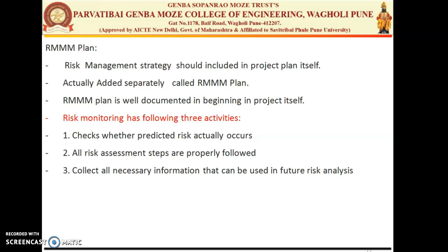So this is the first risk, computer crash. We have taken the example of computer crash for understanding the RMM. What three steps does the computer crash have? First is the mitigation. That means you need to avoid the risk of computer crash. That means you need to keep multiple copies of the database, so the data will not be lost if the computer crashes. Second is to monitor. That means your manager needs to frequently watch your working environment where the actual team works. And the third is the management. If something goes wrong, we need to take immediate actions so we can avoid or manage that risk. If it occurs, then we can easily manage the risk.